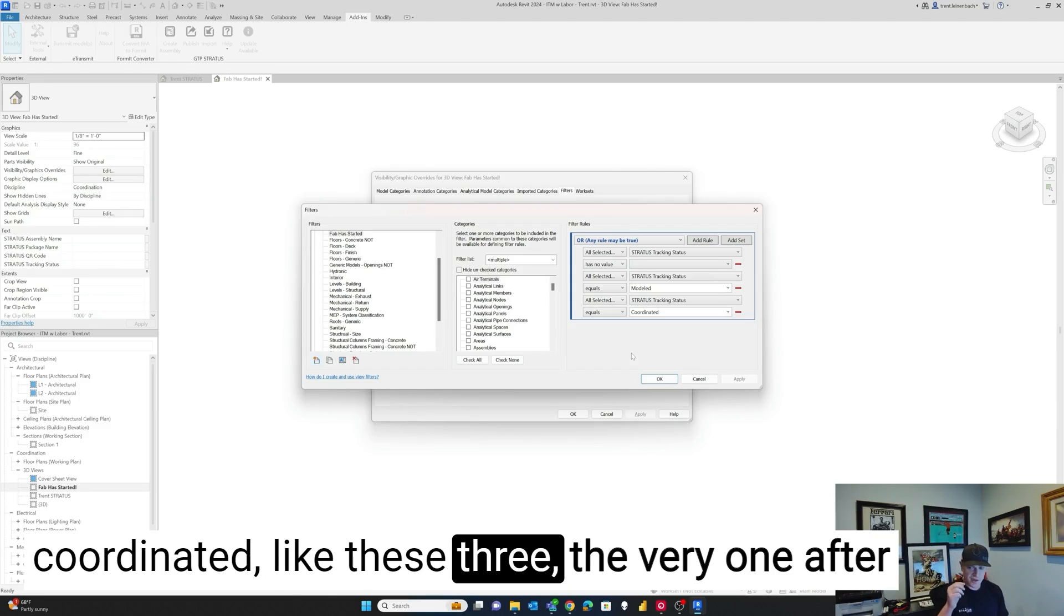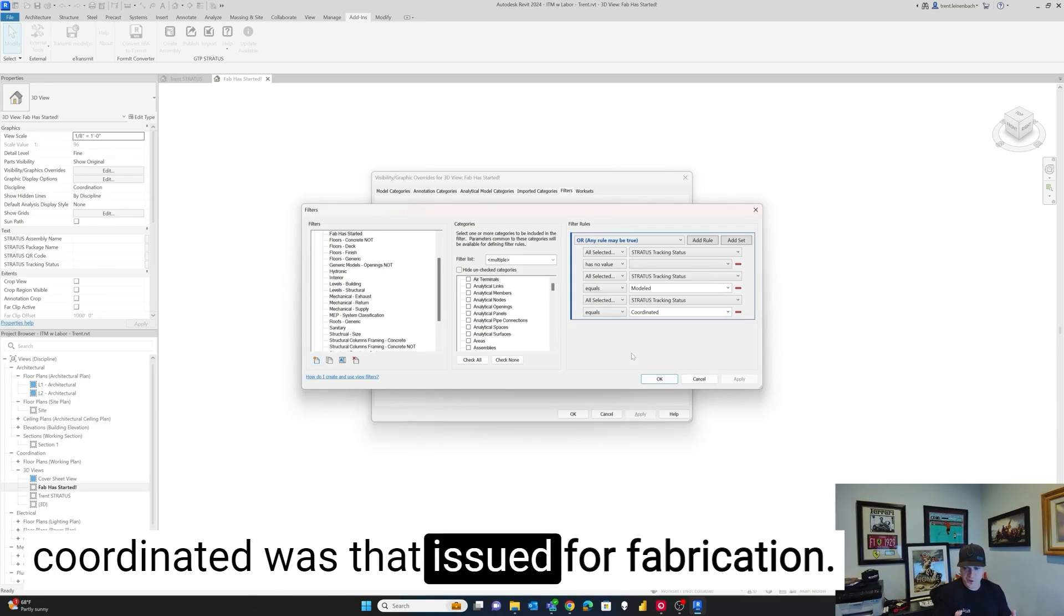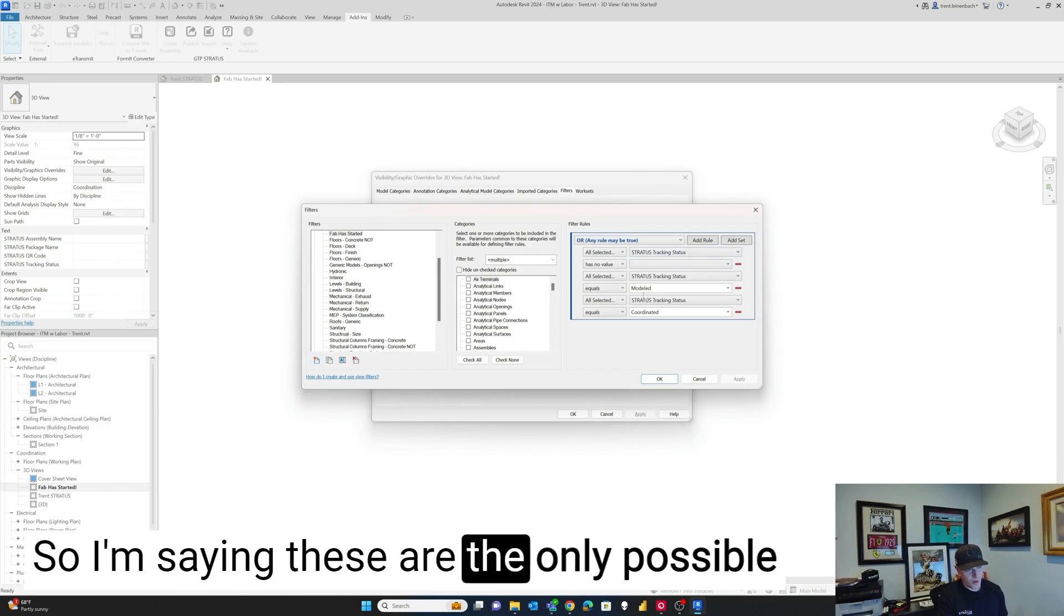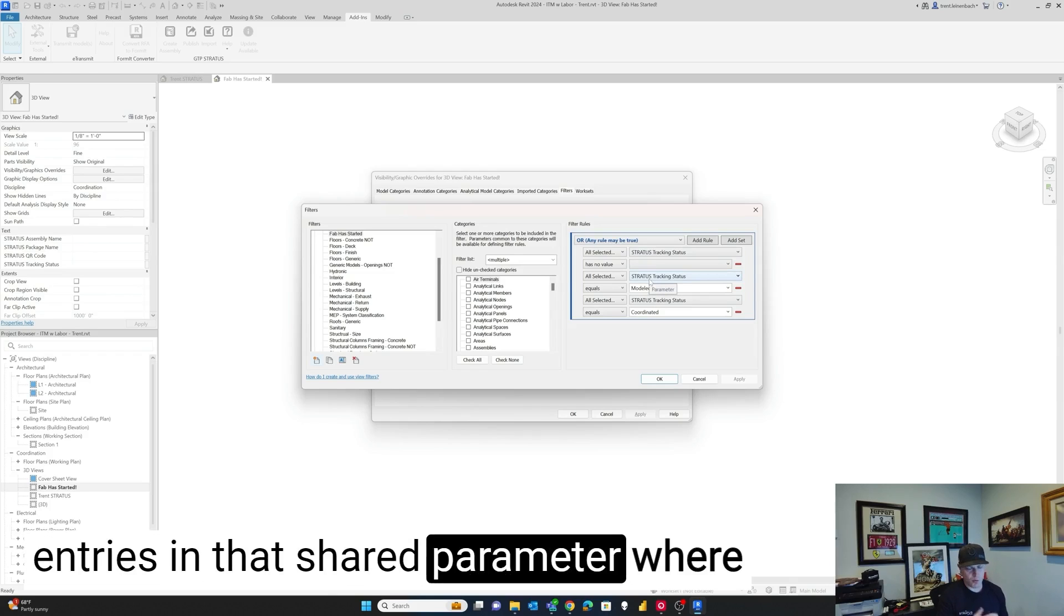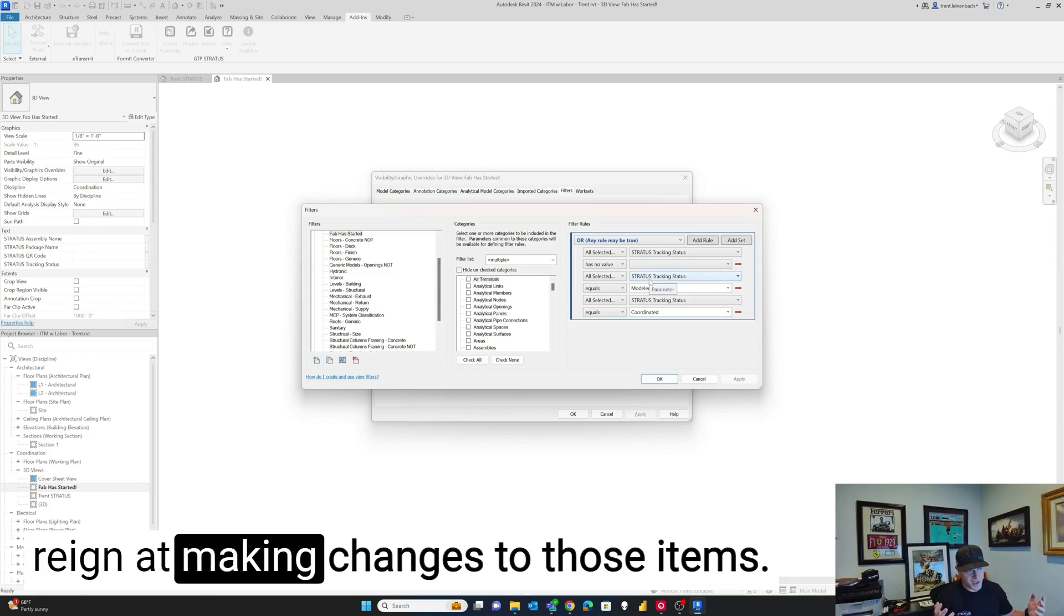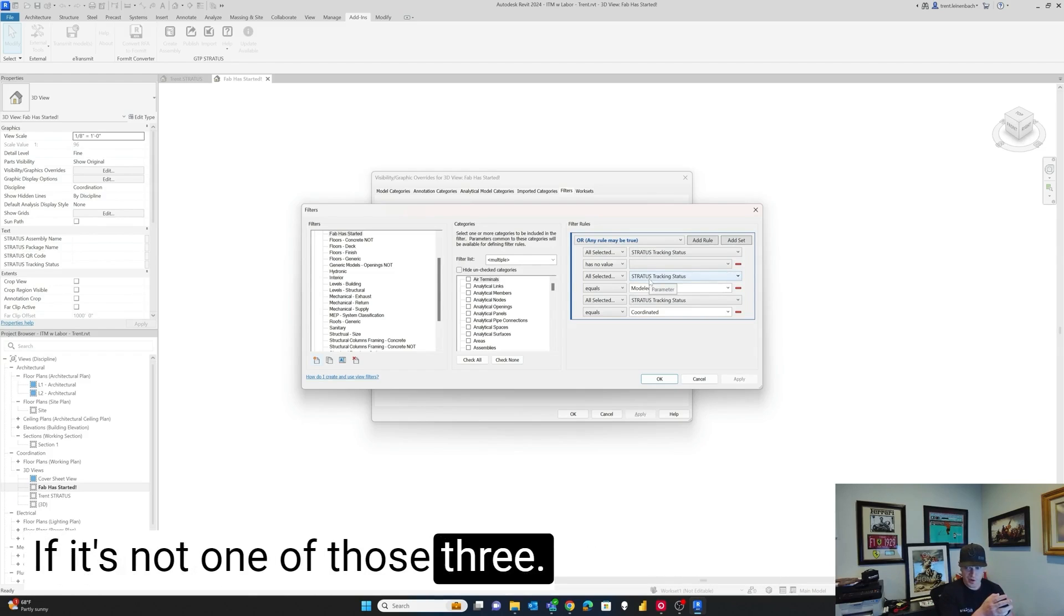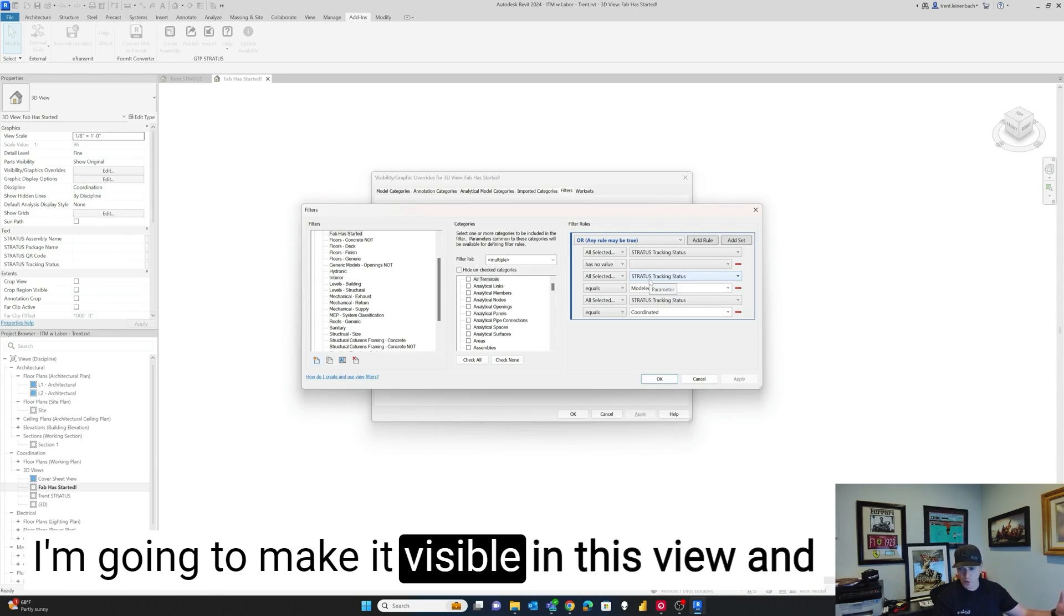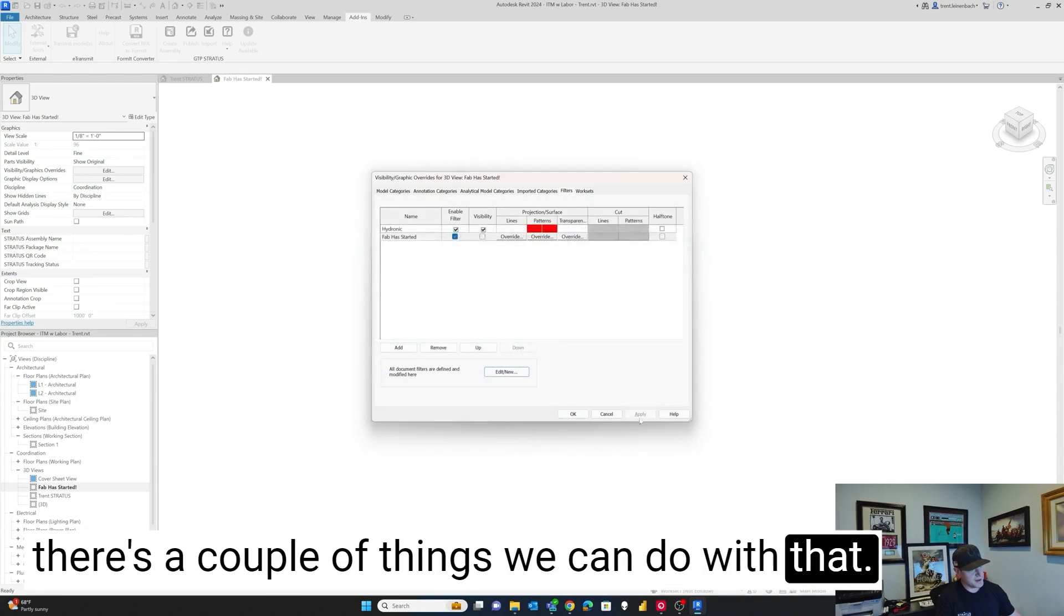the very one after coordinated was that issued for fabrication. So I'm saying these are the only possible entries in that shared parameter where I would want a detailer to still have free reign at making changes to those items. If it's not one of those three, I'm going to make it visible in this view. And there's a couple of things we can do with that.